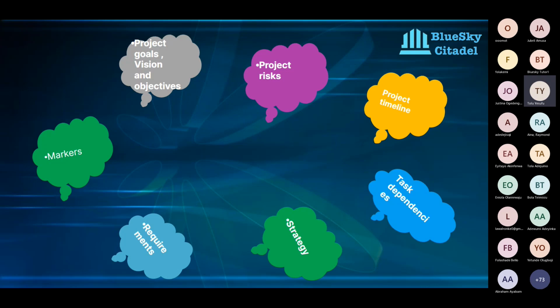So you want to make sure that once your requirements have been gathered, because BAs, I'm sure you know that it's not only about gathering requirements and prioritizing them. For you to even be able to write stories and acceptance criteria, once you get your requirements, you should analyze your requirements. There are different steps to this. So you get your requirements, you analyze your requirements, you have your requirements prioritized, and then you're able to map them out on your product roadmap.